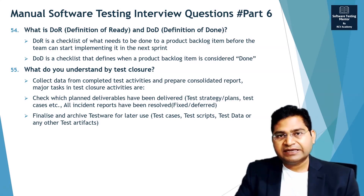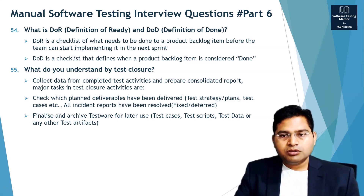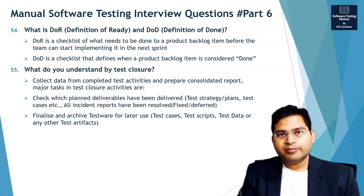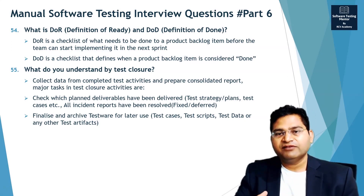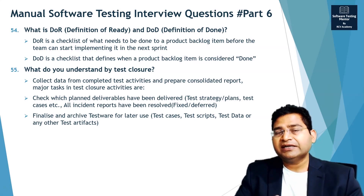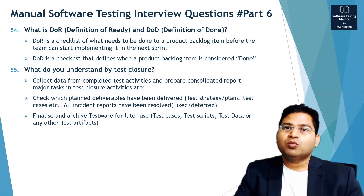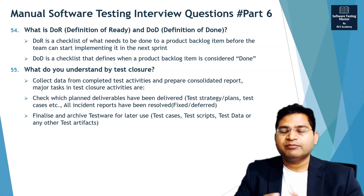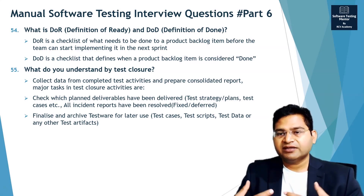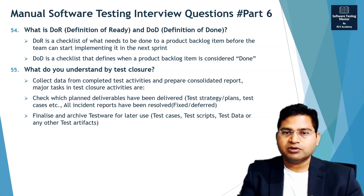So once you have created the test summary report — the test closure report — you also not only just prepare that report, you also ensure that all the planned deliverables have been delivered. So what all deliverables were there committed — test strategy, plan, test cases, etc. — what has been delivered, what all incidents or defects have been reported, how many of them fixed and resolved. So all of this becomes part of the TSR, test summary report, or test closure report.